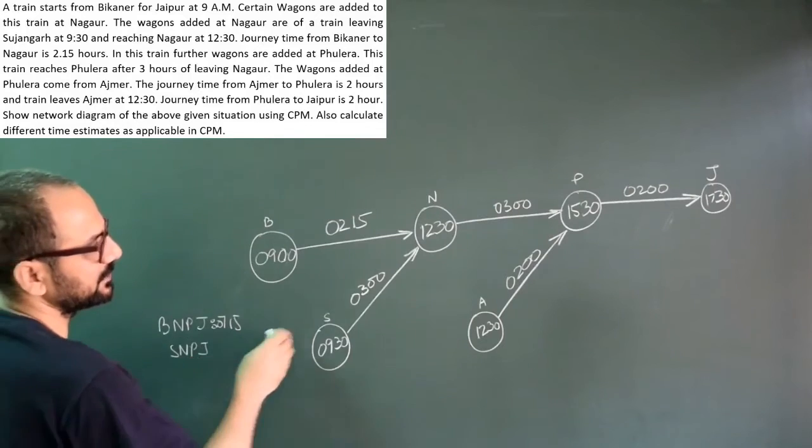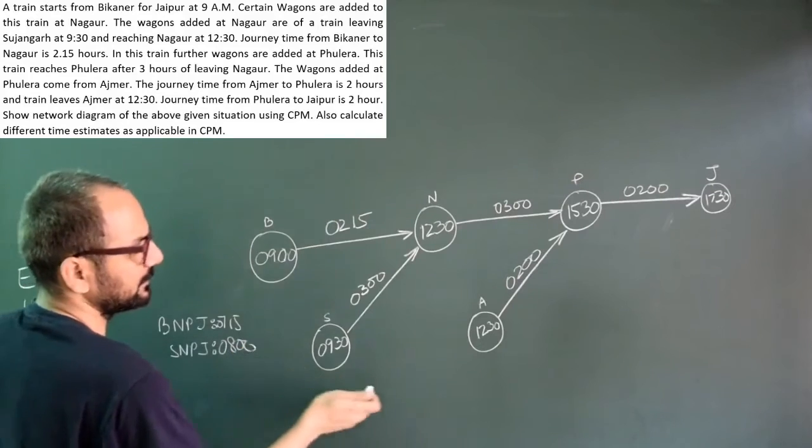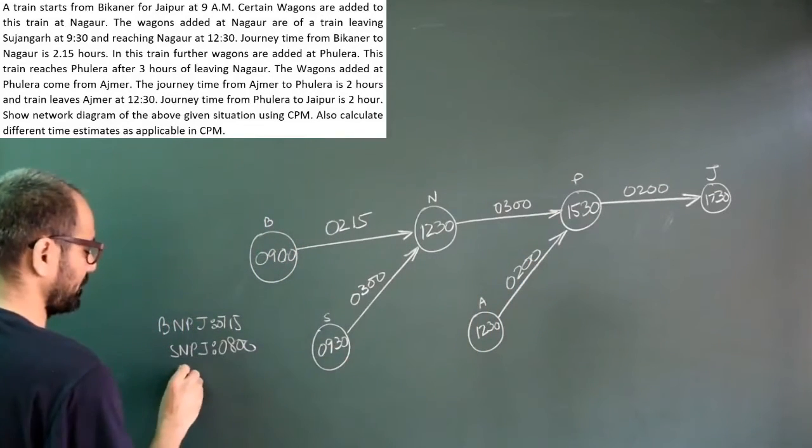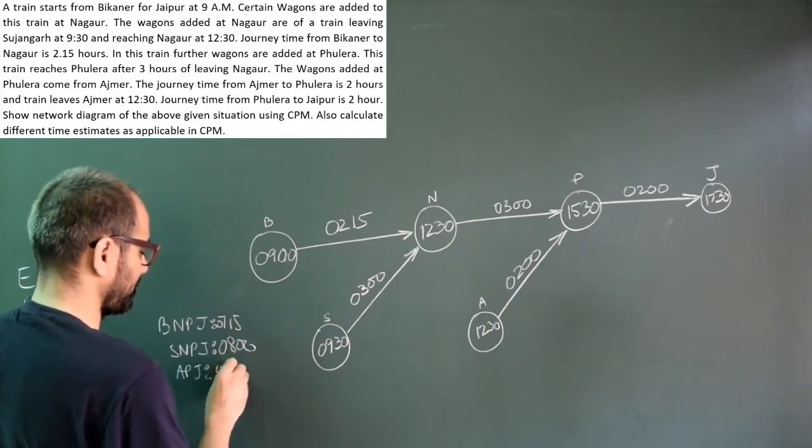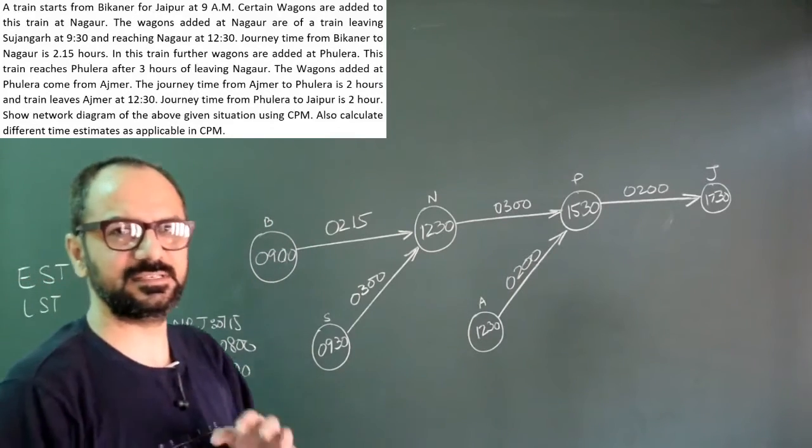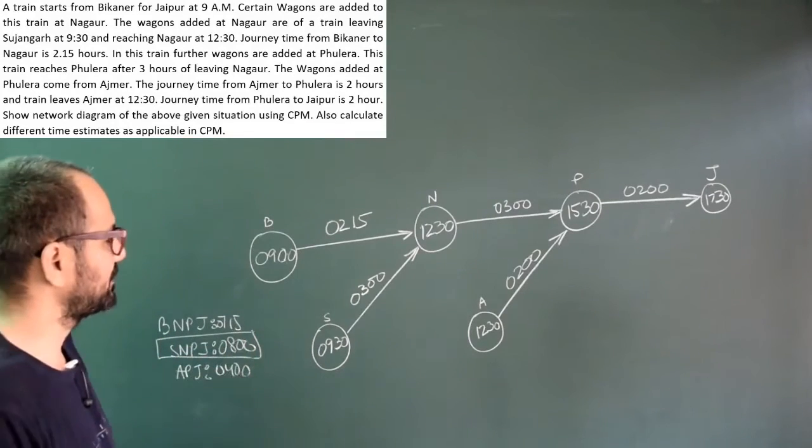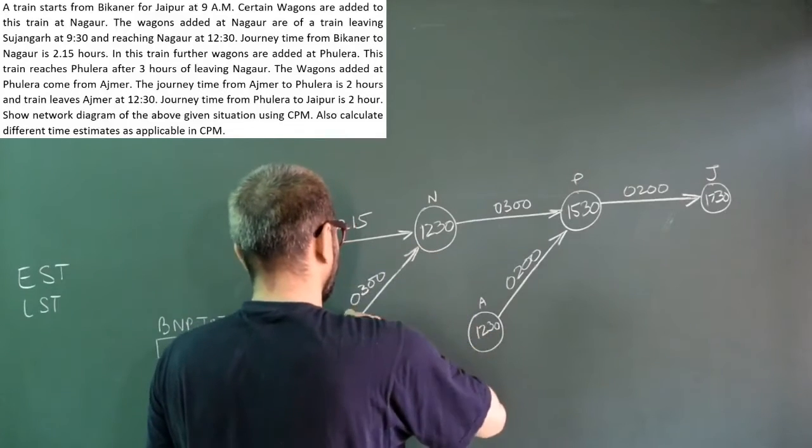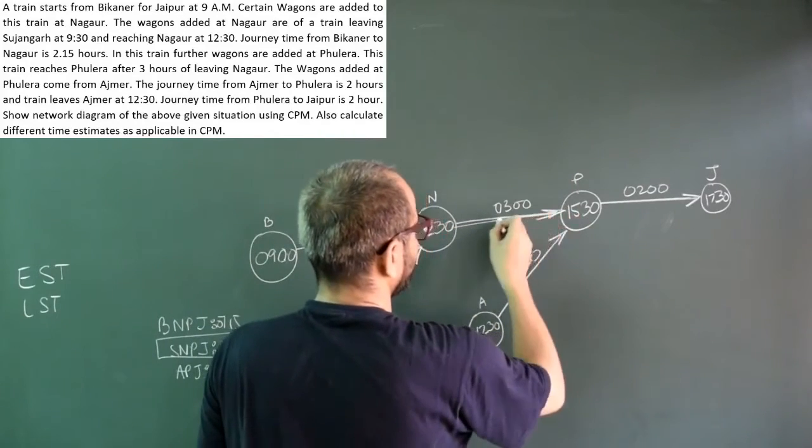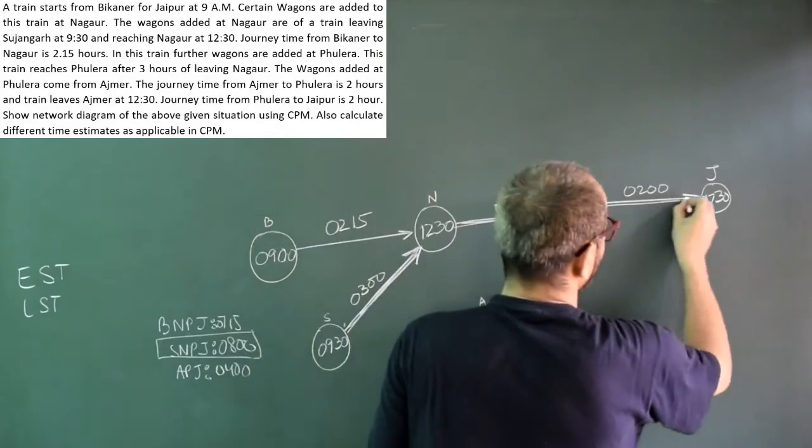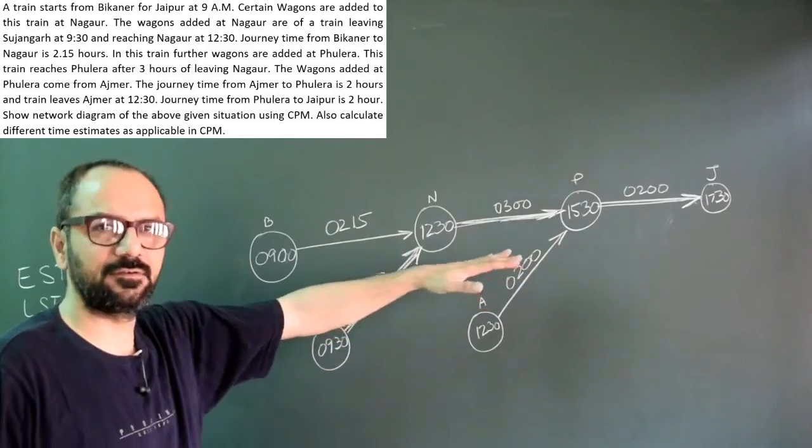Then we have Sujanagad, Nagore, Phulera and Jaipur. It is taking 3 hours, 3 hours, 6 and 2, 8 hours total. And then there is Ajmer, Phulera and Jaipur, taking 4 hours. The concepts remain the same. Which is the longest path? This is my critical path, SNFJ, Sujanagad Nagore Phulera Jaipur. We represent the critical path by double arrows.